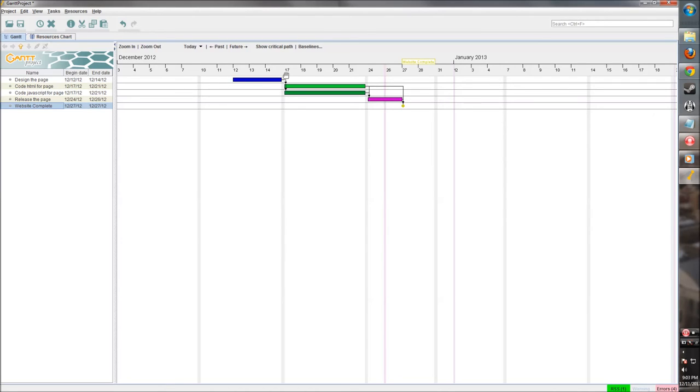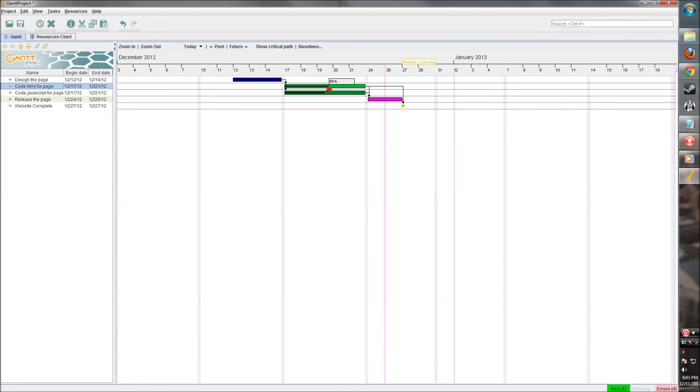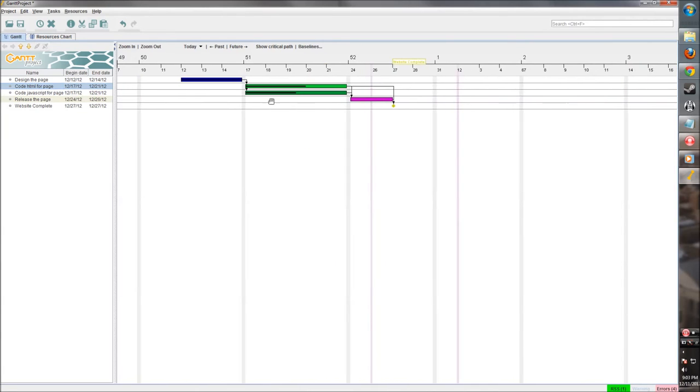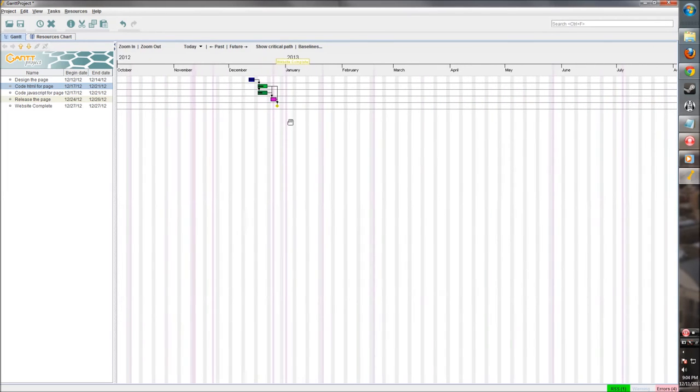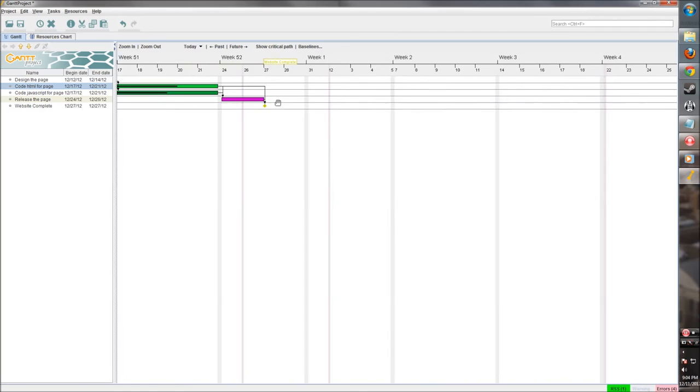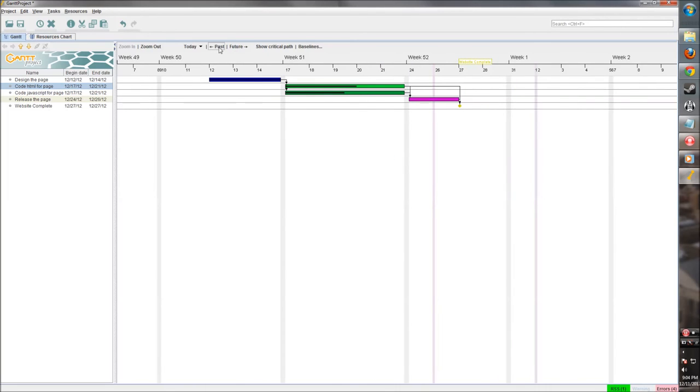Now we have a chart here. We can say we already started and we want to get some progress displayed in this chart. We've done our designing, so we can left-click on the left and drag it all the way across - so that's complete. Then we can say we're 50% done with the JavaScript and let's say 60% done with the HTML. You can also, if you scroll with your mouse, you can zoom in if things are getting a little tough to work with that far out. So you can zoom in really close - this is the farthest you can zoom in - and that makes things a little easier. And then you can see right here, this is where our milestone shows up on the list up there. We can see the critical path needed to complete - it highlights it in these diagonal lines, which is helpful.